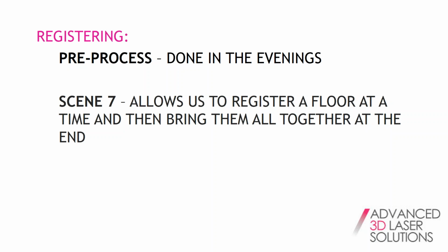And by doing that, for instance, we've just done a particular project which, like I said, was 120,000 square meters, and was able to register it all together in 2 days. And traditionally, that would take something like 5 or 6 days. So there's a huge time saving.